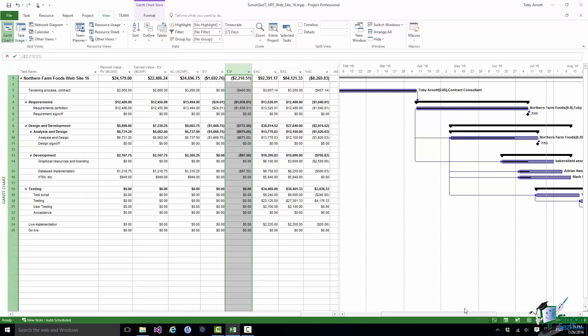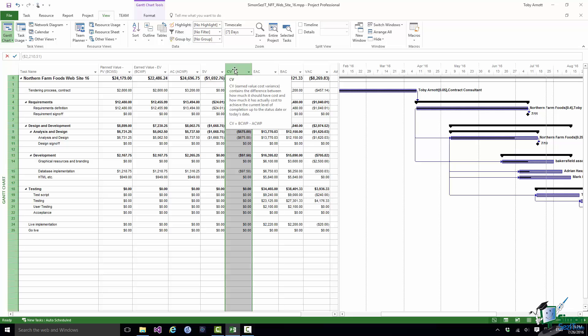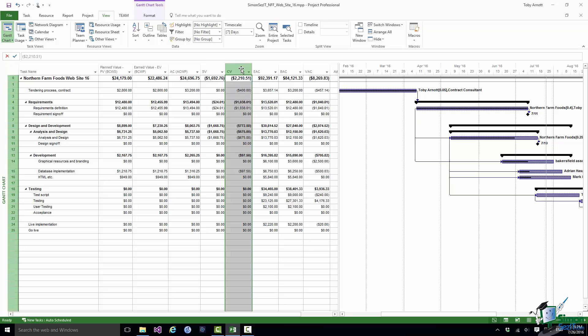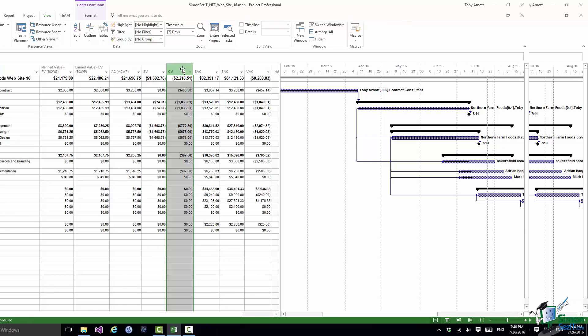Now the next column is CV or Cost Variance. And CV is calculated as BCWP minus ACWP. And it is the difference between how much it should have cost and how much it has actually cost to achieve the current level of completion. Now once again if everything was going to plan that would be a column of zeros but the negative values indicate that we are spending more than the earned value deserves. Or if you like we're spending more to do the work than we should be spending. So a negative cost variance is also bad news.